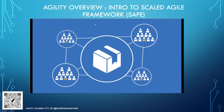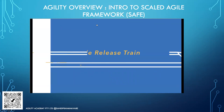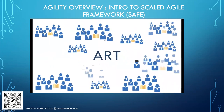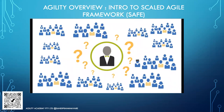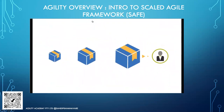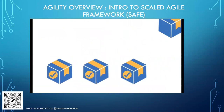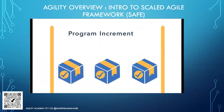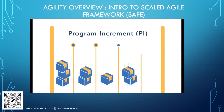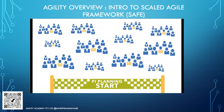At the end of each iteration, the team demonstrates completed work in an iteration review, then reflects on improvements in a retrospective. The Scrum Master coaches the team and facilitates events. In an enterprise, multiple agile teams work together as a team of agile teams called an Agile Release Train (ART), comprising 50 to 125 people. ARTs are cross-functional, including all people needed to explore customer needs, build, and deliver solutions. The ART works within a timebox called a Program Increment (PI), typically five iterations long.